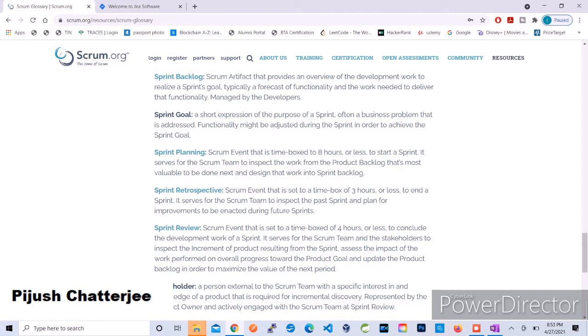Generally, the idea of the sprint retrospective is that developers go over any improvement they think needs to be done. They put it in the product backlog, and then they take it on the next sprint or the following sprint, whatever they feel needs to be. That gives the entire team an improvement opportunity by following a better process over time.